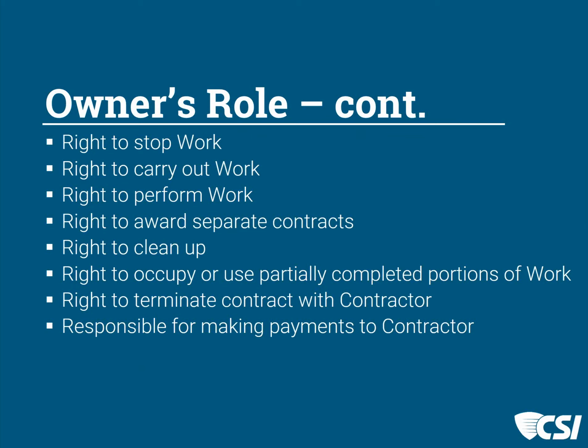So if this contract is extended by X amount of time, and typically it's a month, if this is a monthly general conditions charge, if we have to stay here another 30 days, it's going to cost you $10,000 or $3,000 a day or whatever the number might be. I've never seen actually the time itself, but that's an interesting thought. I have seen it, though, just be listed as the overhead and general conditions cost for an extension.